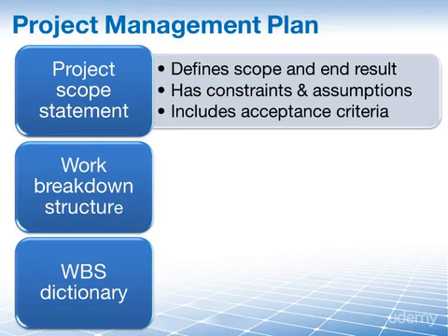One more important factor that you find in the scope statement are acceptance criteria. These criteria must be used during purchasing so that you purchase goods or services that ensure that you can meet those criteria. This is only a small selection of the items that you may find in the scope statement. Generally speaking, it's a good idea to always take the time to read the entire project scope statement very early on in the plan procurement management process.